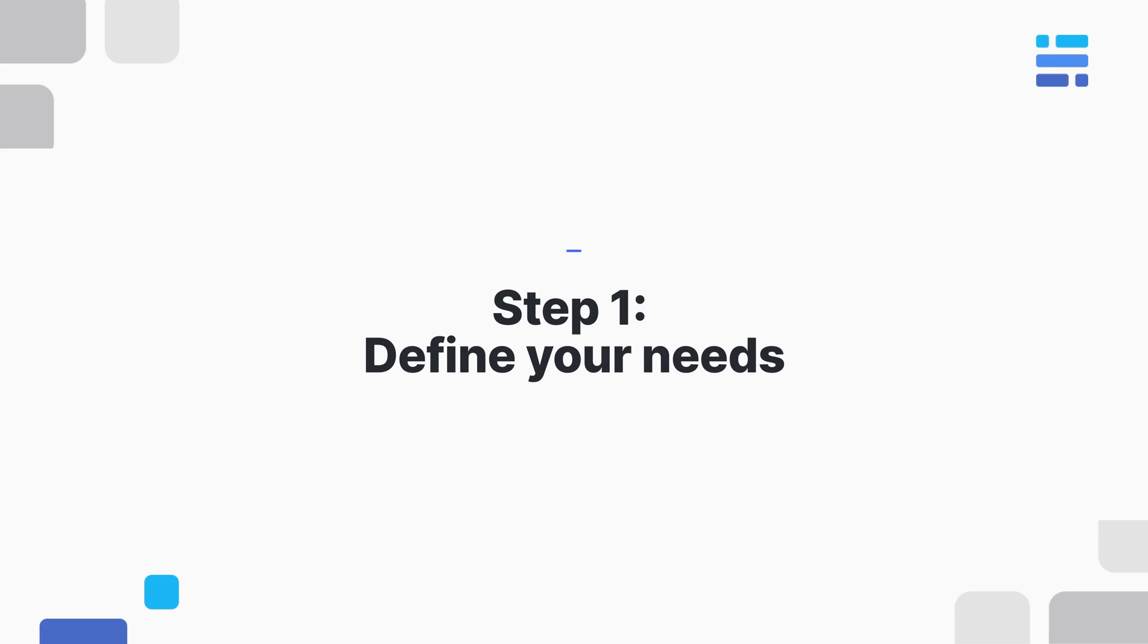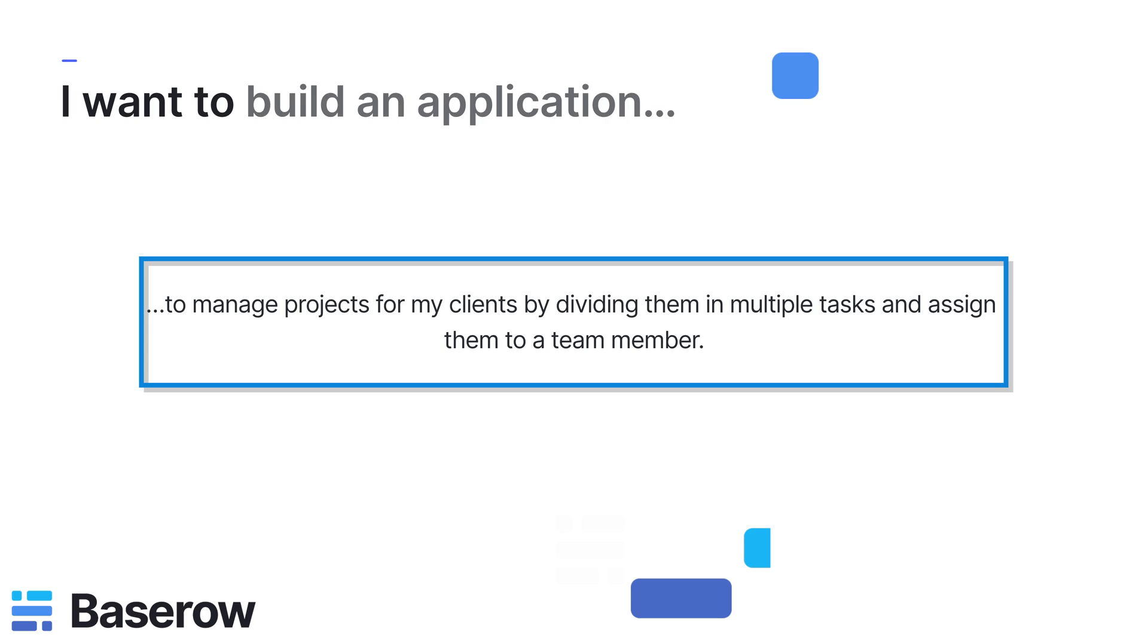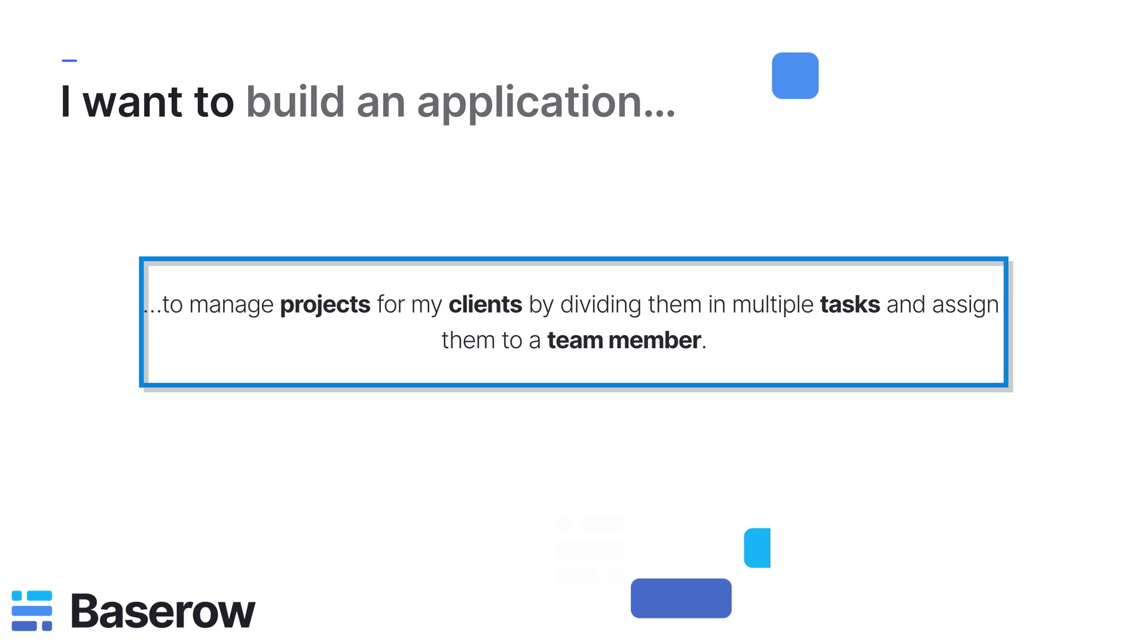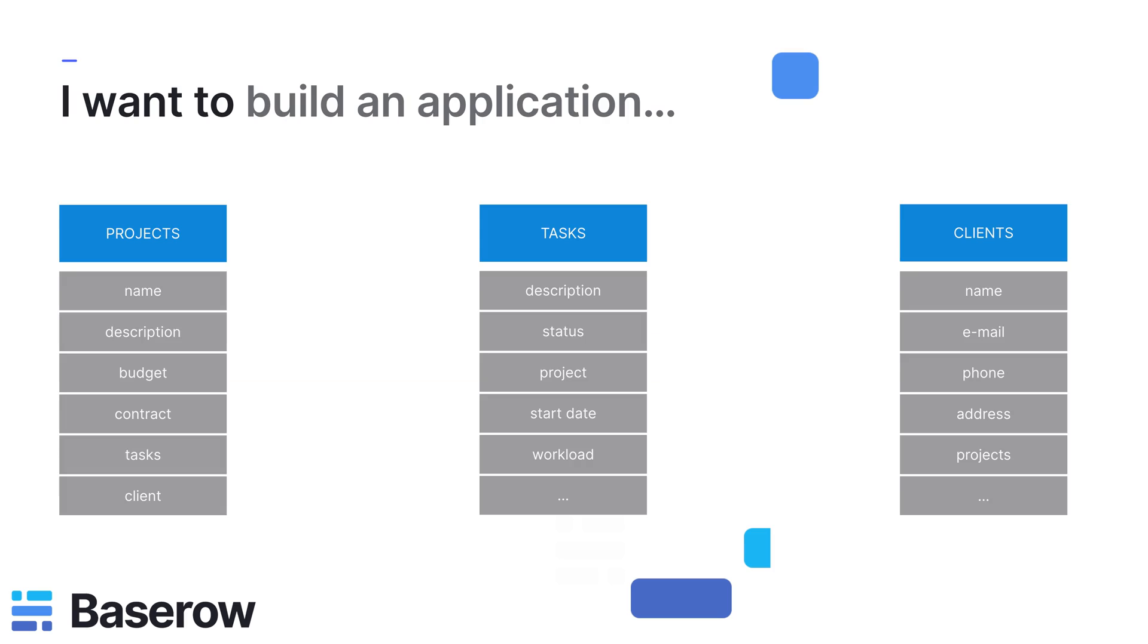Let's start with focusing on what we actually need. A good approach is writing this down in a sentence and marking all the nouns. Those are good candidates to become a table. In this scenario, we have clients with projects that are divided in tasks. Next, think about the properties or attributes you need for each table.